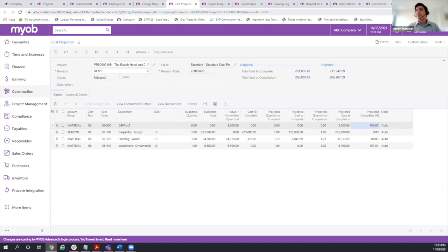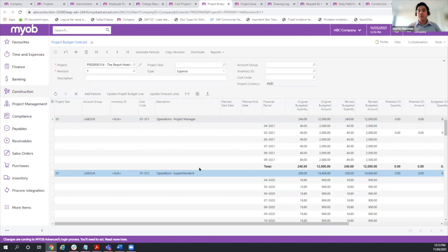Another way to break down your budget is through a forecast, right? We were talking a while ago about being able to manage your cash flow across the life cycle of a project, especially for those longer term projects. This is just a way to do it. Each element on your budget, you can see broken down according to each period, and you can tweak that as you expect. Especially for those longer projects, with some of the material costs you don't want to purchase up front.